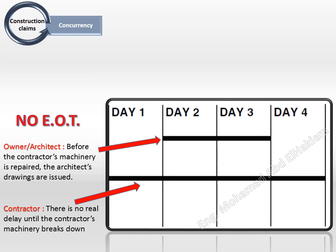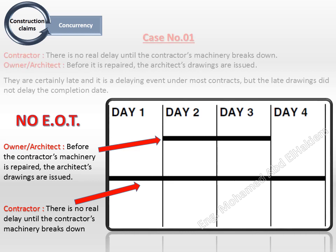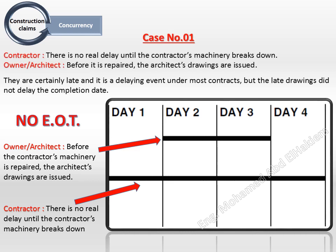Case number 6. There is no real delay until the contractor's machinery breaks down. Owner situation: before it is repaired, the architect's drawings are issued. They are certainly late and it is a delaying event under most contracts, but the late drawings did not delay the completion date. The determination result here is no extension of time.